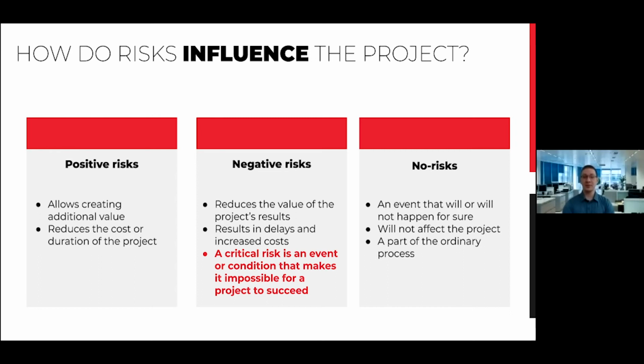From this perspective, we can divide all the risks into 3 categories. Positive risks, also called opportunities, that may increase the value that the project brings or decrease the cost or duration without decreasing the value. Negative risks, also called threats, that may decrease the value that the project brings or increase the cost or duration without increasing the value.